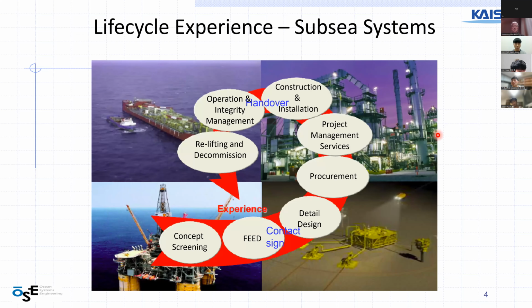Let's see an example. Here is the life cycle of subsea systems. It starts from concept screening, then front-end engineering design follows. Between FEED and detailed design, there is signing of contract. Detailed design is similar to engineering. Next, there are procurement and construction.